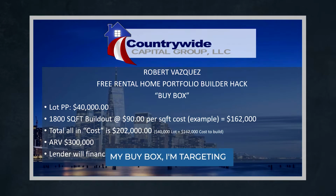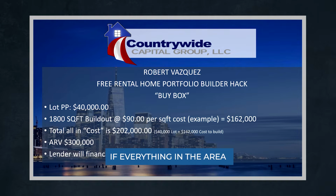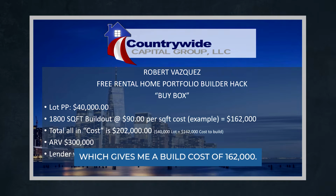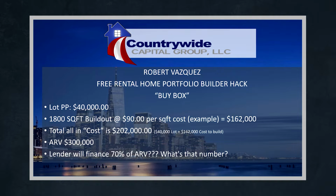So in this example, my buy box, I'm targeting lots that are $40,000. If I see the area, again, I'm not gonna build an 1,800 square foot house if everything's 5,000 square feet, and nor am I gonna build an 1,800 square foot house if everything in the area is 1,000 square feet. So we're gonna target an area where we can find a lot for $40,000. We're gonna build an 1,800 square foot house at $90 per square foot as an example, which gives me a build cost of $162,000. My total all-in cost is $202,000, which is $40,000 lot plus $162,000 to build.